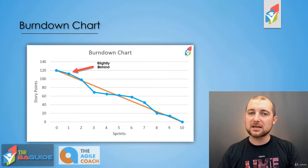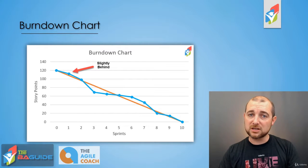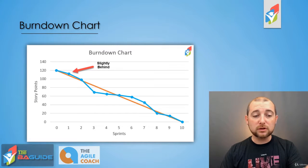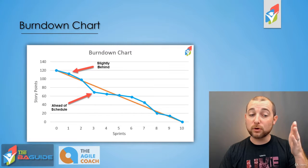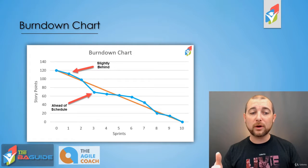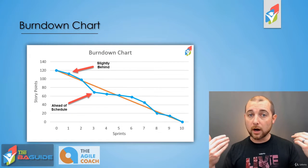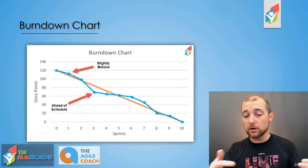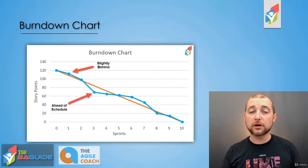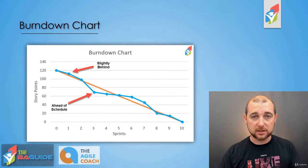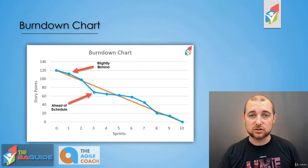As we move into our second sprint, you can see we caught up a little bit — we were able to complete some additional story points and catch up towards that trend. As we look at sprint three, we actually got ahead of schedule. We were able to complete more story points than what we needed to in order to achieve the full 120 story points at the end of the project in 10 sprints.